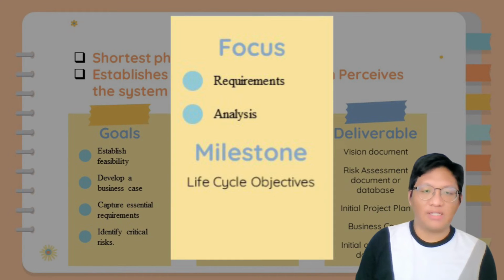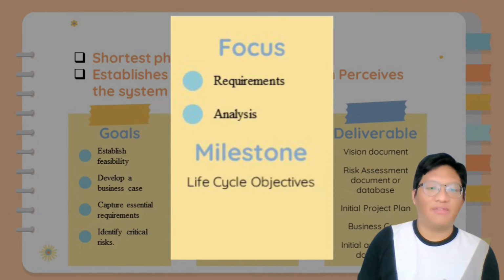The main focus in inception phase is on requirements and analysis workflows. In some cases, part of design and implementation workflows might also be done due to the decision to build a proof of concept or a technical prototype.